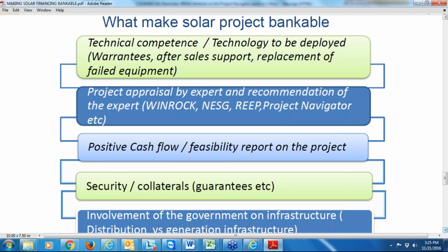The cash flow of the project has to be positive, and you have to sensitize the cash flow, which is one other thing that is very critical. If your project has been viewed by an expert, they'll be able to tell you that sensitizing the cash flow means that if things don't go as expected on the project, you have enough safety valves to ensure that this project continues to generate the cash flow to repay the loan. These are things that we must build into the project.